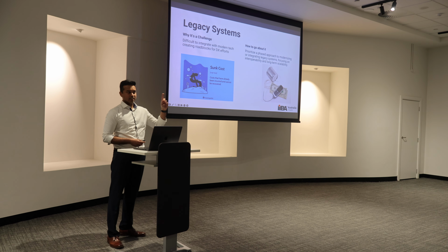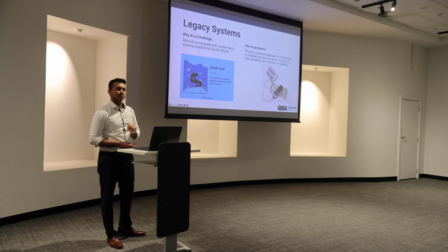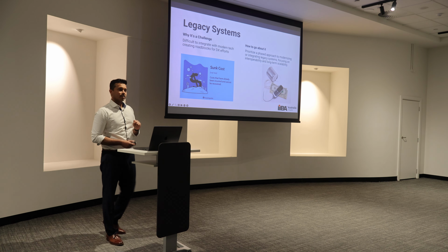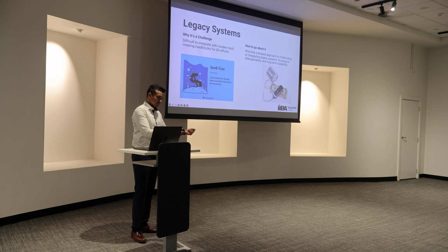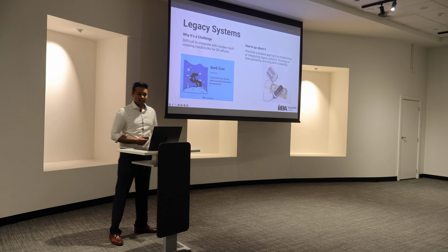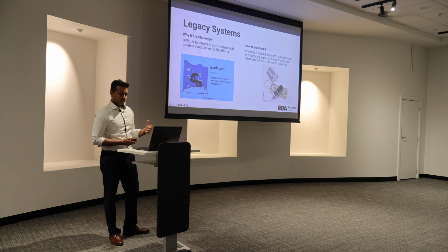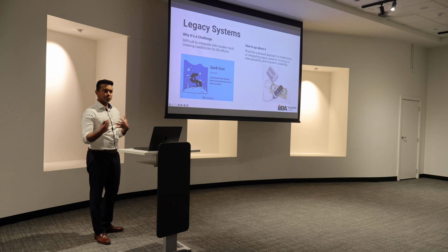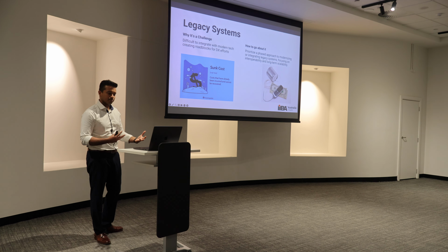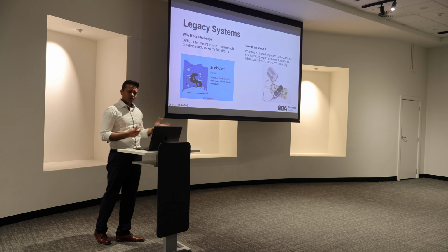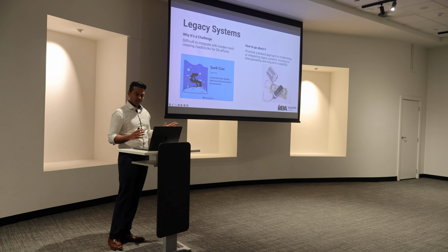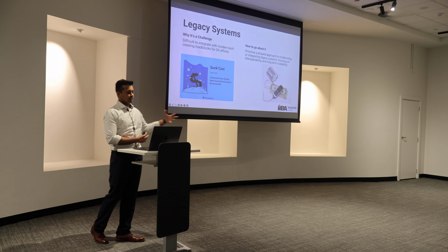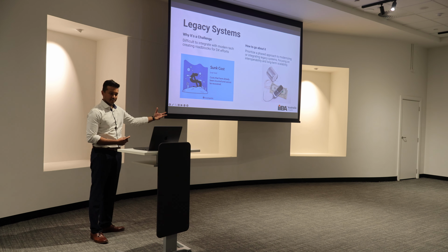And there was one person in the company who was taking care of it and knew what to do if it broke. And this person was very close to retirement, and no one else knew what to do. What that meant was, if she left or the system crashed, people don't get paid. They decided to keep the software. And this was the system integrator's nightmare, because it was that file-based system. It didn't have any way to communicate with any other system. So it was so out of date, inflexible. It ended up becoming more expensive to integrate around it than to replace it. But because the company was so inflexible, they didn't want to replace it.